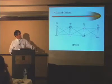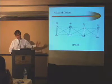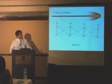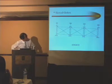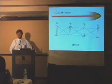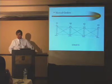This is when the contractor, the steel erector, wants to get paid and go home, because all the steel is up, he's ready to go, he's finished. Unfortunately, sometimes a job inspector will come in and say, well, that's not what it looks like on the drawings. It shows the girders plumb on the drawings. What are you going to do? Get that erector back here, or somebody fabricated something wrong.